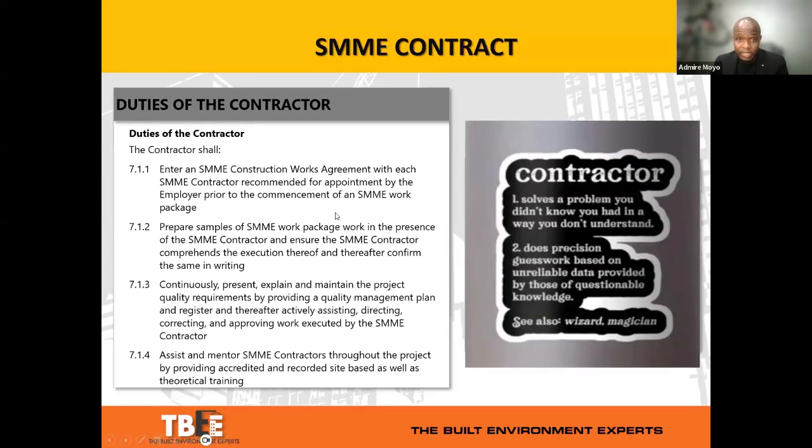Then the duties of the contractor, in terms of the specific SMME agreement, as I've mentioned before, part of their duties are to enter into an SMME construction works agreement with the SMME contractors prior to the commencement of the work, prepare samples of SMME work packages in the presence of the SMME contractor, and to ensure that the SMME contractor comprehends the execution of that work.